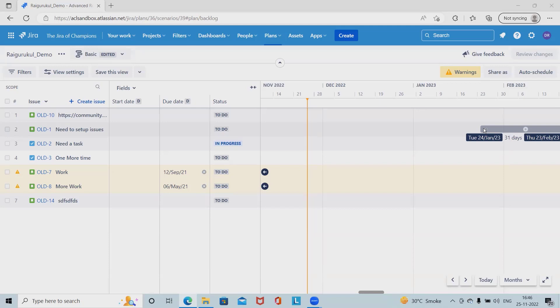The former, every two weeks, is recommended for teams that release with regular cadence since any issues that aren't completed can be bounced to the next release. For teams that have irregular releases, advanced roadmap can give us the projected release date when we define a release based on the completed issues.